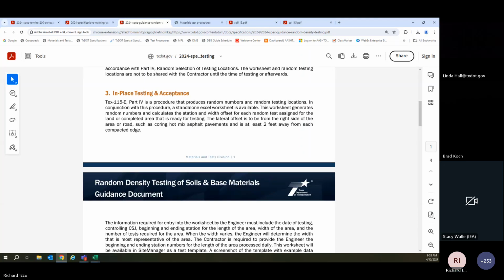And so if the first shot fails, we do the 4 turns. Do we have to use a random number for the next test? Good point. We take the 4 at the same pin location. If the result still fails, then you'll have to come up with another random number. Or you take that first randomly generated spot, it fails, and it was a bad spot visually to you, you still got to take it anyway. Then you're going to do your judgment call, and you're going to start testing to try to isolate where the bad spot is. It's no different than the way we were doing it before. You may have to fix that spot. It's a bad spot no matter what, right?